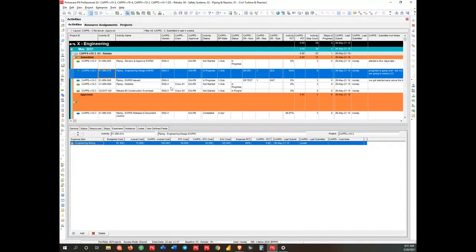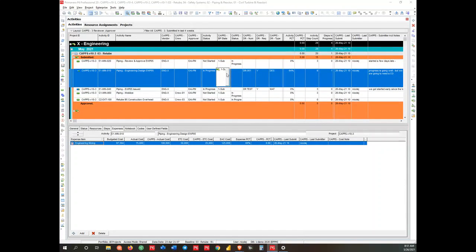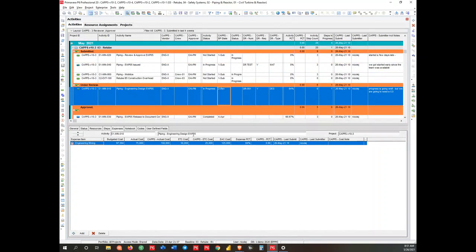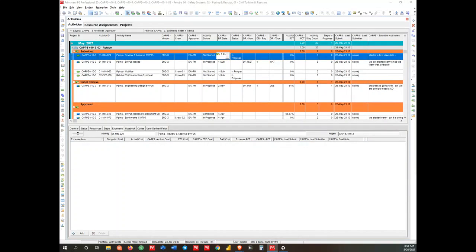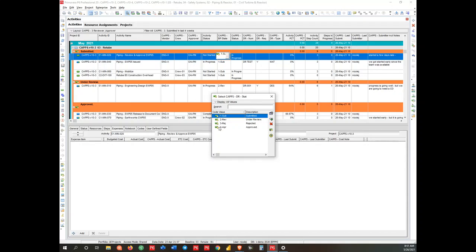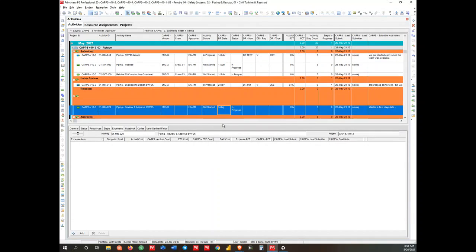If I'm happy with these submissions, I can approve them, have them run in. If there's something I'm not happy with, I can tell them that I'm reviewing this. If there's something that I don't agree with whatsoever, I can tell them I'm going to reject it. Both of those will go back to the person working in CAPPS so they can see it.